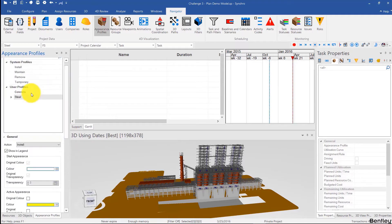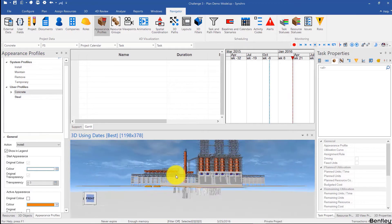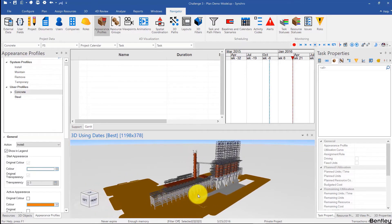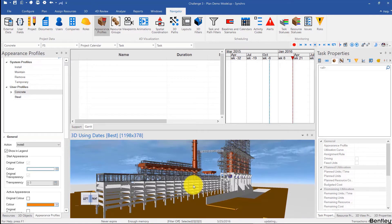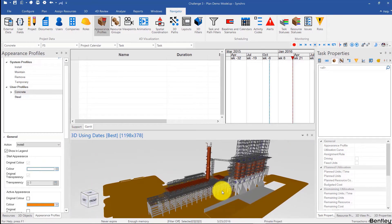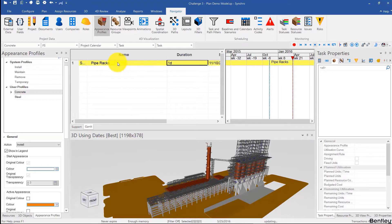Now that I'm ready I can pick an appearance profile — for example concrete — and I can decide how I want to group my tasks. You can start with concrete and do all of the concrete, then steel and do all of the steel, or you can structure it starting with the pipe racks, finish that, and then the structure over here and finish that. I'm going to start with the pipe racks, so I'll type in pipe racks and give a rough estimate — maybe 50 days, I'll just type in 50.